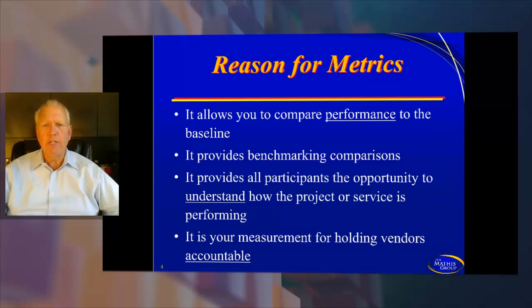So it allows us the ability to compare performance to the baseline. So the first thing we have to do is understand what the baseline is. Now PMBOK tells us that we baseline at the beginning of execution, and from baselining until the end of that project, nothing happens without going through change control. Now, if you're working on a project and your vendors are not baselining the schedule, the cost, or the scope, then that's going to be too loose. So you want to make sure that this project gets baselined so that you can measure against performance.